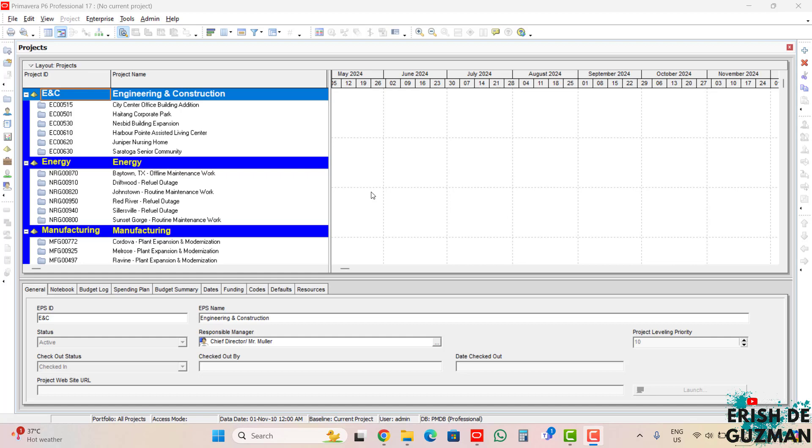Inside the project, there are a variety of information that can be accessed such as the activities, resources, and relationships. But to access all of that or to play around all of that information inside the project, the activities window must be displayed first.